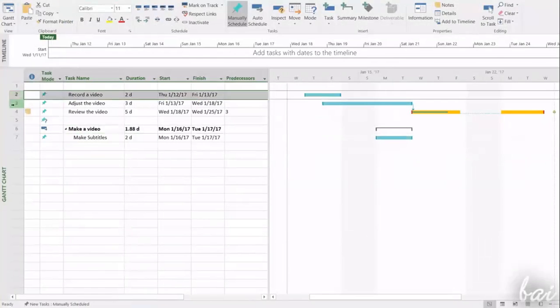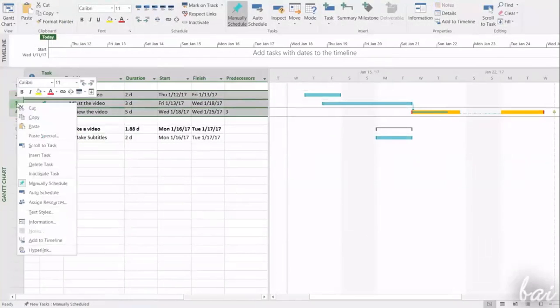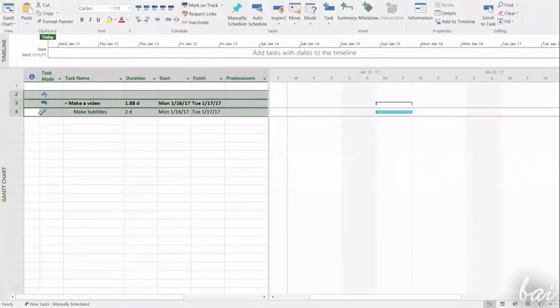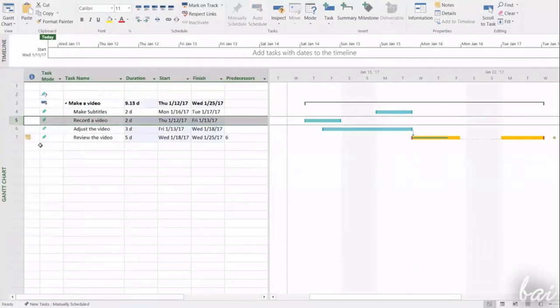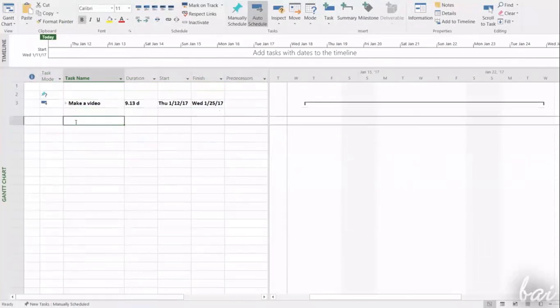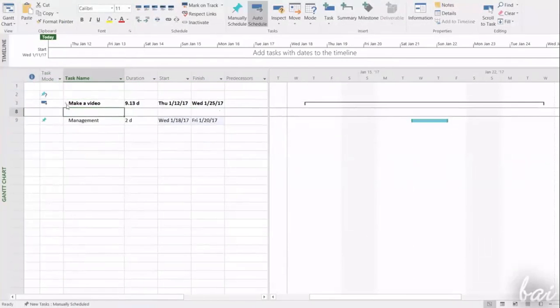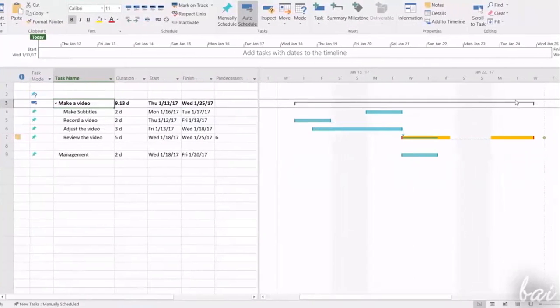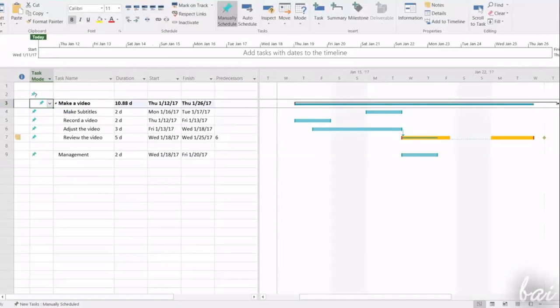or simply select existing ones from the far left, right-click and use Cut, and then paste to add these inside the summary. Close the summary to add new tasks outside of it. In the Gantt chart, the summary is a simple container, long enough to contain the earliest start and the latest finish date of all its tasks. Just in case the summary is defined as manually scheduled, you are able to modify its duration directly. Just include all the relevant tasks in the time, or it will show errors indicated by a red-colored bar.